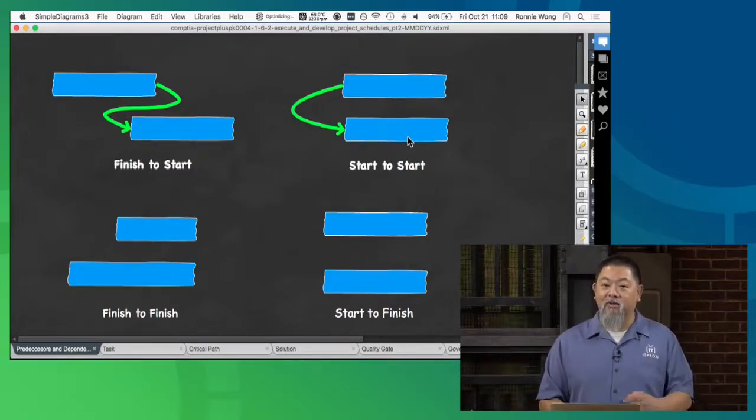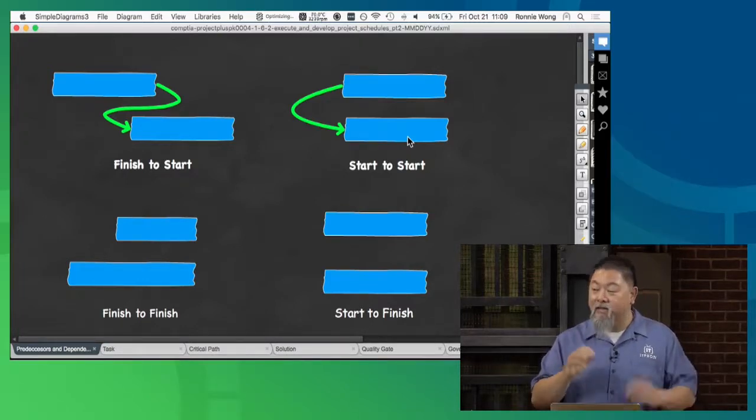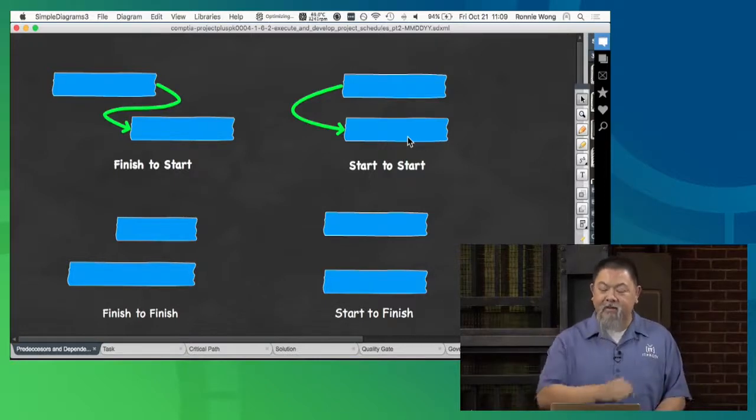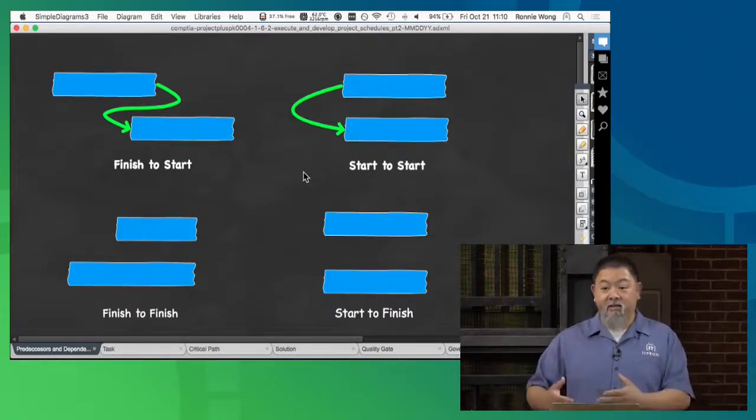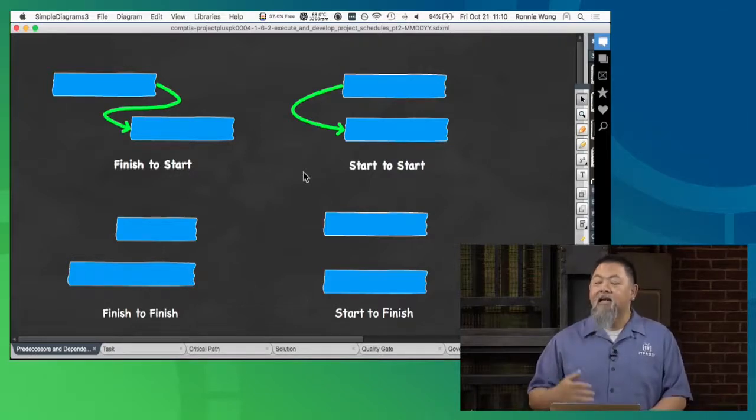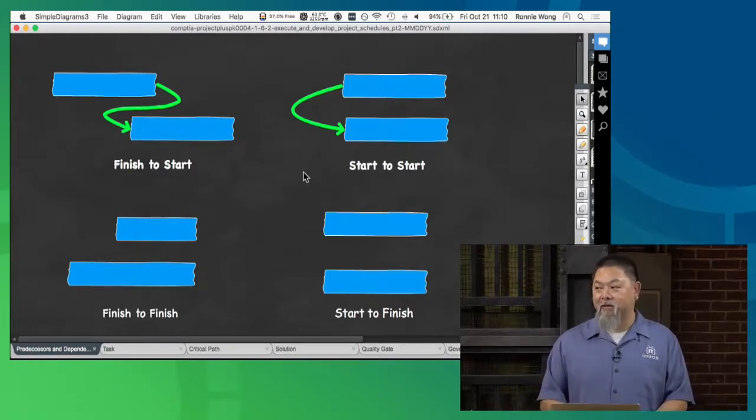Okay. So in other words, if task A has to be complete, totally done, before task B can start, you're at a finish to start. Got it. If task A begins, then sometime in the next day, sometime in the next few weeks, whatever you might want to call it, as long as it's actually started its process, then you can start as well, okay?